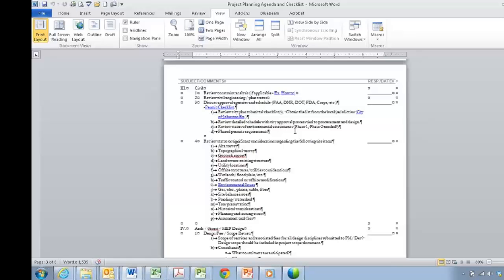Section 4 of that is just a great checklist, and in these meetings, on the kickoff meetings, we will typically sit down with our due diligence checklist here, and the development person and I will sit across from the table and say, do we have this? No. Who's getting it? Who's got the topo? We have one, great. Geotech, who's got it? Let's get a proposal. Stuff like that. We go right on down the line. Now, granted, many jobs, you won't have to do that portion of it, because you'll already have it, but you may want to still go through this list to make sure you have everything. So just maybe a validation that you have everything and you're not missing anything on there as it may be applicable to your job.